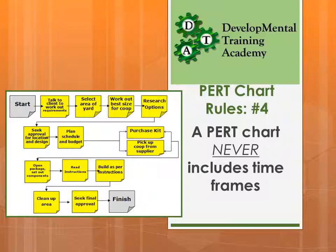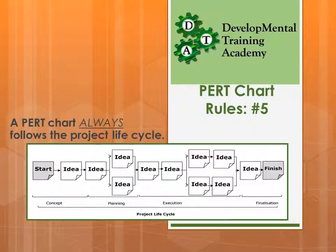Rule number four: a PERT chart should never include time frames. Our basic PERT chart for our chicken coop is just ideas — it doesn't have any time frames included. Rule number five, the bonus rule: a PERT chart always follows the project life cycle. Concept is where you work out the parameters; planning is where you put the structure in place; execution is actually completing the project; and finalisation is tidying up, writing reports, and finalising everything at the end. The PERT chart follows that structure. On extremely large projects the concept, planning, and execution cycles may be repeated, but it will always follow that process.